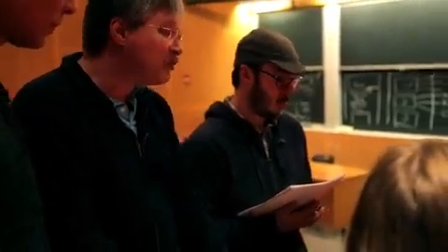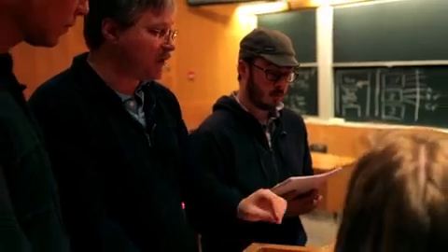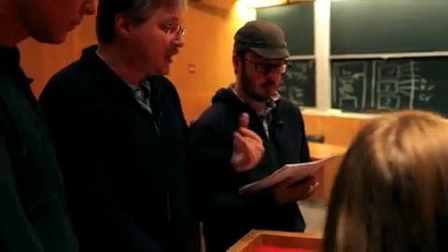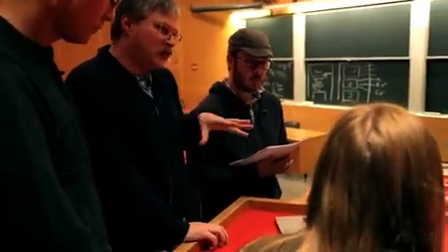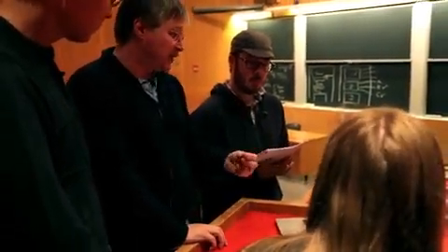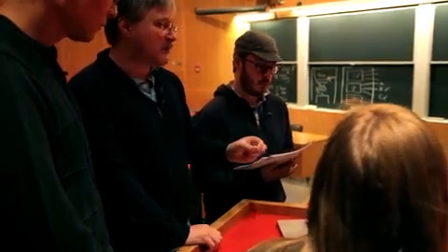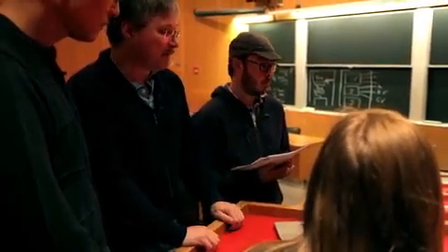When you guys play the game, do you feel that you are winning it? No. All right, so if you don't have it really high in your backlog, you probably should put it there. You need to do the gameplay balancing first thing, because you need to playtest that. You can use yourselves as playtesters to some extent for difficulty, but keep in mind that if you think the game is hard, the game is impossible. If you think the game is easy, the game is hard. Well, I think the game's impossible right now.